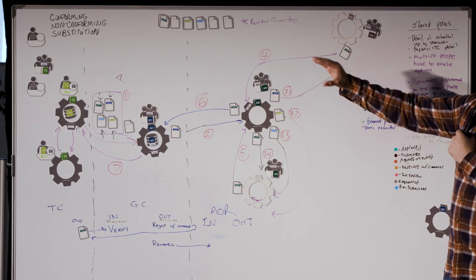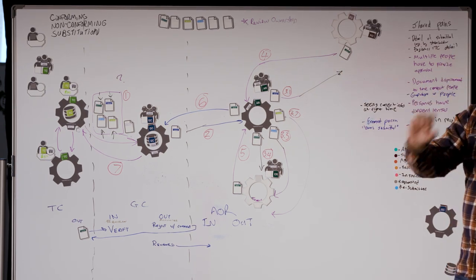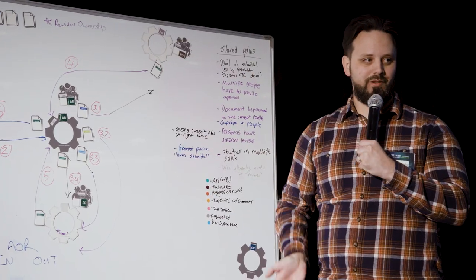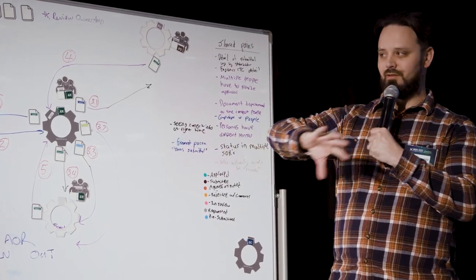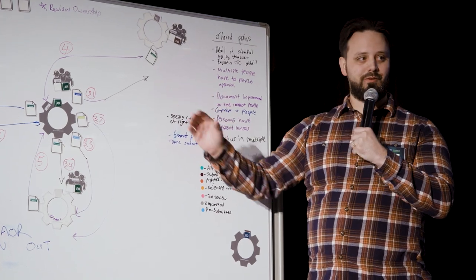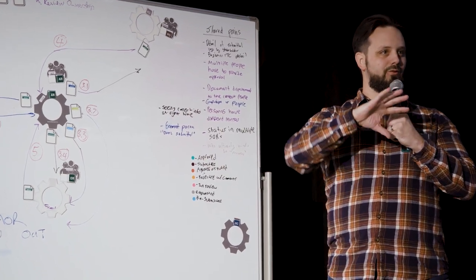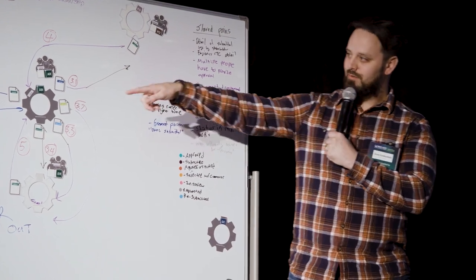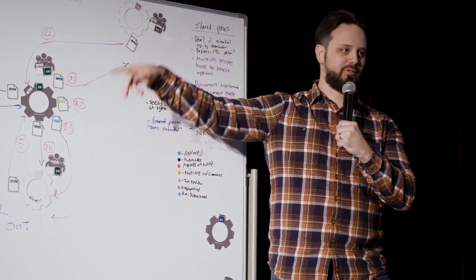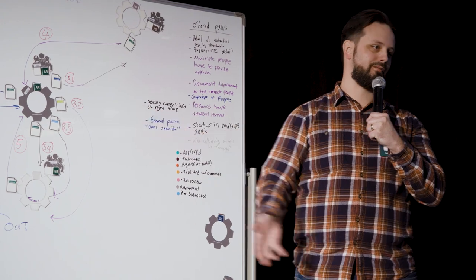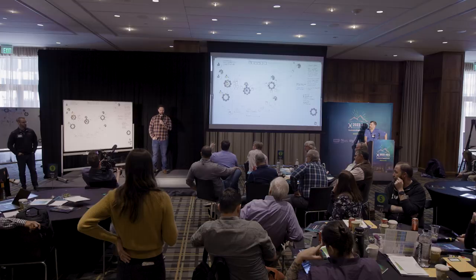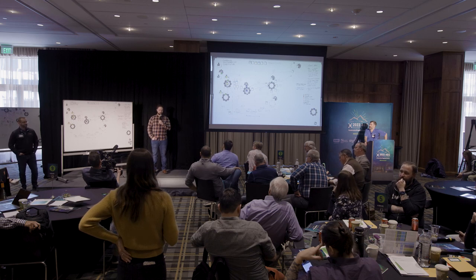For a door, the jam, the doorknob, and the door material all have to be approved before anything gets started — there are interdependencies throughout. If you have things broken down, you want to track what pertains to you and let the rest that doesn't apply go by the wayside.